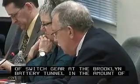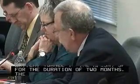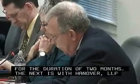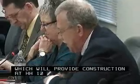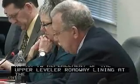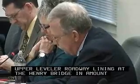The next is with Hardesty & Hanover, LLP, who will provide construction management and inspection services for Project HH10, replacement of the upper-level curb stringers and roadway lighting at the Henry Hudson Bridge, in the amount of $2,920,365 for a period of 3 years, 1 month.